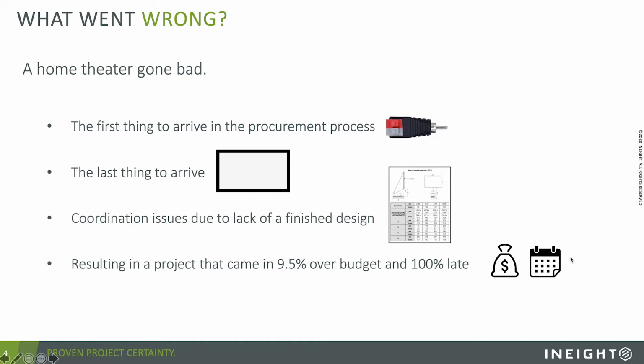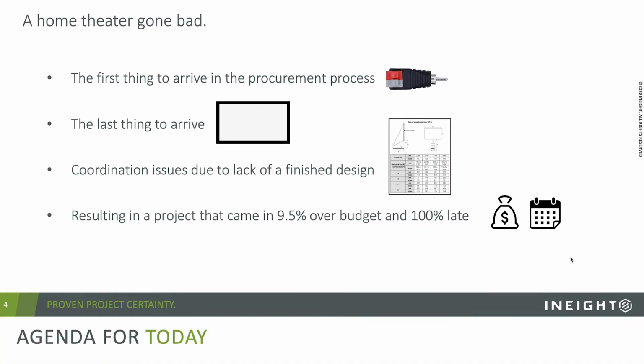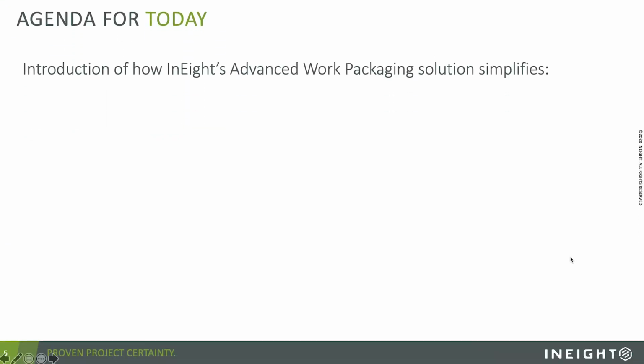And really, that's what we're talking about when it comes to advanced work packaging: how can InEight's concept of this best path of construction and advanced work packaging simplify solutions like that. And the first thing that it's going to work to simplify is knowing when it's the right time to actually begin the work. So I'm not sitting there with a projector pointed at the ceiling because I started too soon on the work. I don't have all of my constraints removed.